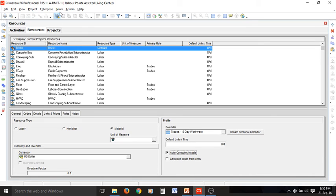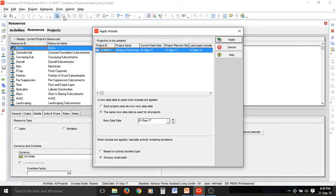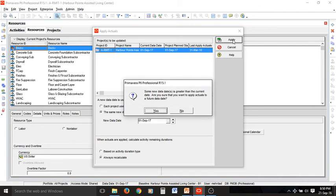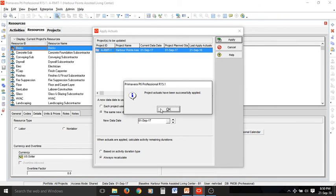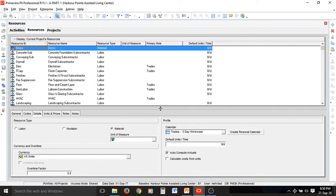The next step is to go to Tools and select Apply Actuals. The data date can be selected here, then we apply it and select yes. The project actuals are now updated. Remember to use this option only for non-labor resources, because for labor resources it has some unexpected consequences and you need to manually update the actual values for labor resources.